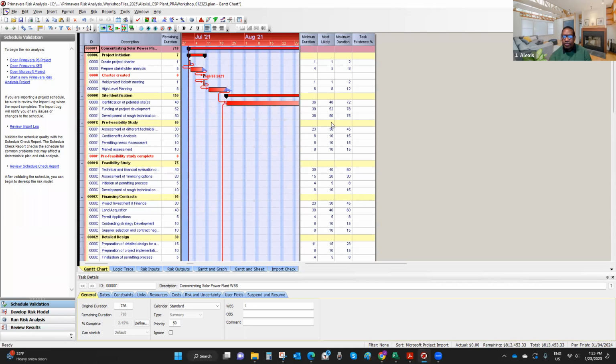So I click OK. As you can see here, I now have the information I need to model uncertainty. Uncertainty modeling means that you express your estimates in a way that says, I'm not sure. It's maybe 4 days, 5 days, or 8 days. It's uncertain. When you perform Monte Carlo simulations, the software will estimate that the activity or the work package, whatever the case might be, can take a value from 4 to 8.